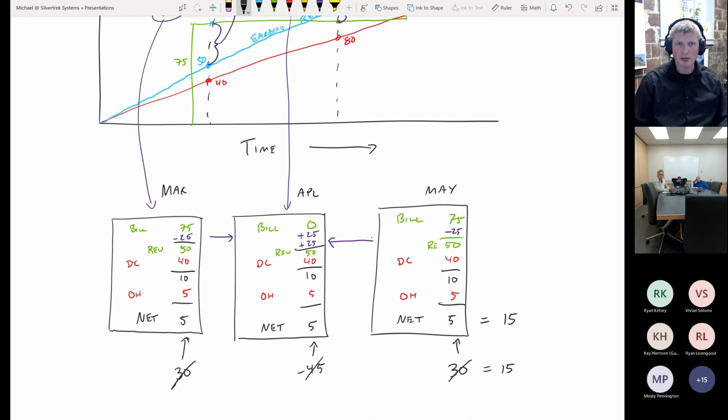In March, it looks like we're making bank. In April, the owners are panicking and laying everybody off, selling off their brand new truck that they bought at the end of March when they thought they were doing great. We have this kind of whipsaw effect, where we're just going back and forth. Earned revenue smooths all that out and says we get only the earned revenue on the profit and loss.